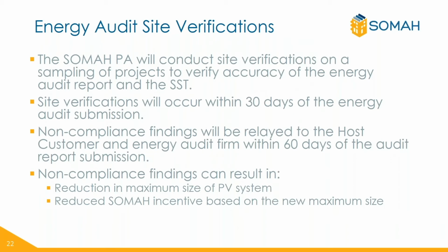And within 30 days of the energy efficiency compliance milestone, the SOMAH PA will conduct site verifications on a sampling of projects to verify accuracy of the energy audit report and the solar sizing tool. If there's anything out of compliance, it will be relayed to the property owner, energy audit firm, and host customer within 60 days of the original submission.